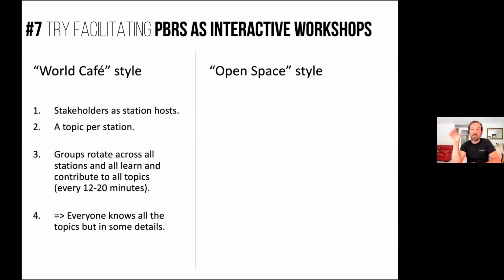You set up stations like corners of a large hall, for example, right? Each station will have a table and a flip chart. And if you are in a virtual environment, it's just basically different parts of your big Miro board, right? But basically these are the stations. And each station gets a stakeholder or an expert and a topic. And then you have these groups of people from different teams, right? You have multiple groups, and these groups rotate and talk to every stakeholder one at a time. Every 12 to 20 minutes, somebody gives a signal and the teams rotate and now go and learn from the new stakeholder.